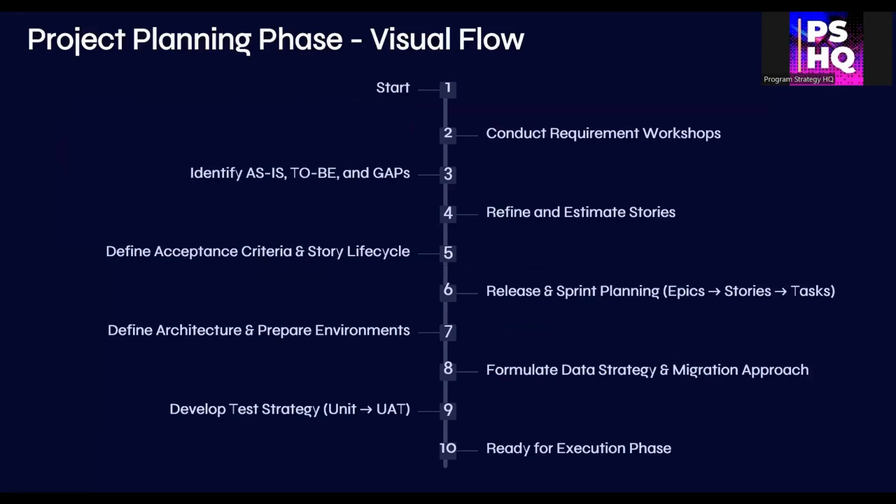Here's a quick look at the planning workflow. You'll begin with requirement workshops, define the as-is and to-be, then refine stories, plan your sprints. Once backlog and velocity are aligned, you define your architecture, environments, map your data strategy, and finalize your test plan. By the end, you're fully prepared to start execution with confidence.